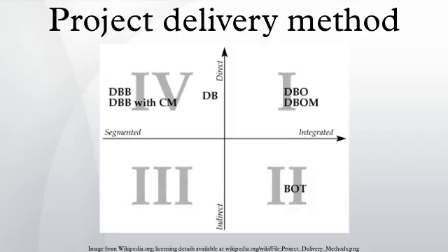When the various service providers are segmented, the owner has the most amount of control, but this control is costly and doesn't give each provider an incentive to optimize its contribution for the next service. When there is tight integration amongst providers, each step of the delivery is undertaken with future activities in mind, resulting in cost savings, but limiting the owner's influence throughout the project.